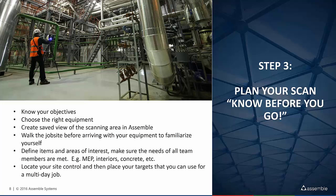It's essential to walk the job site before arriving with your equipment and familiarize yourself with the site — especially before or after pouring concrete. You want to know the situation: where can you place your scanners? Knowing what each team member needs before a scan is very important, and safety always comes first. Also critical before starting a scan: locate your site control and place your targets. A target gives you the ability to add the correct coordinates based on survey controls to your scan, which is important for registering and aligning your point cloud to BIM.